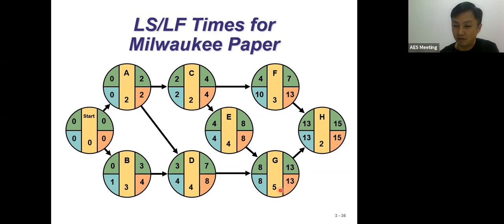So we move backward, we minus. Once we minus here, the next thing is 3. Now, based on our predecessors, this will be getting 8. Now, 8 will be looking into E as 8 and also D as 8 here. 8 minus 4 is 4, 8 minus 4 is 4. I think that is fine here.